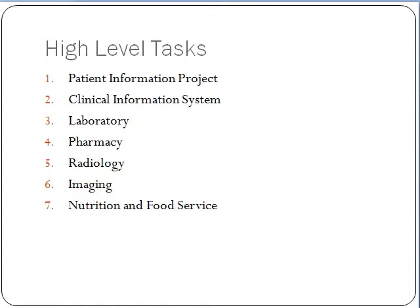The seven high-level tasks include the patient information project, clinical information system, laboratory, pharmacy, radiology, imaging, and lastly nutrition and food services.